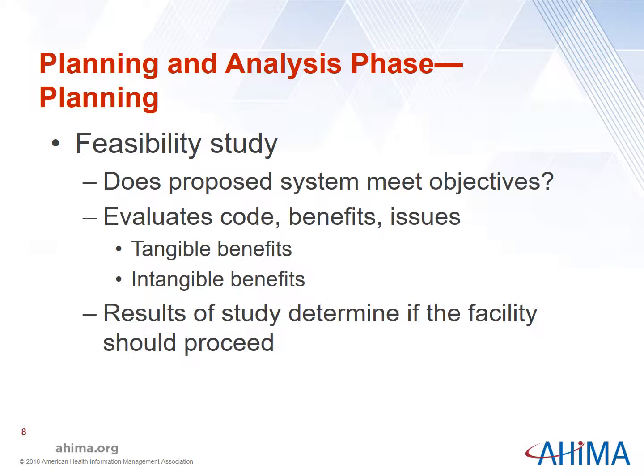The study examines the cost, the benefits, and any expected problems, and then determines whether or not to proceed with the proposed IS. The benefits should be both tangible and intangible. Tangible benefits are easy to quantify in dollars, while intangible benefits cannot be quantified monetarily.